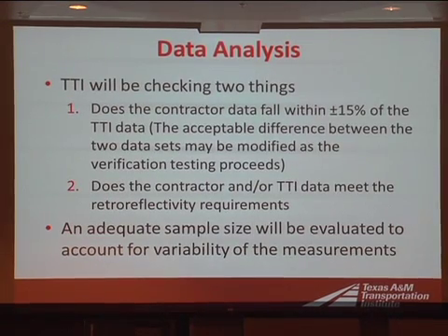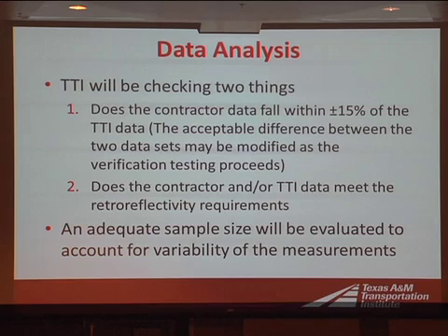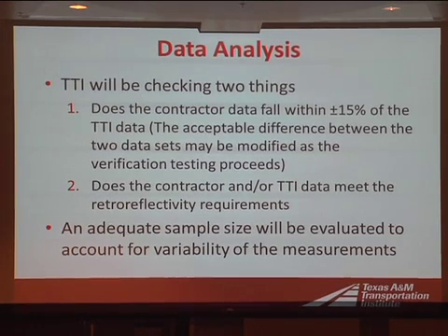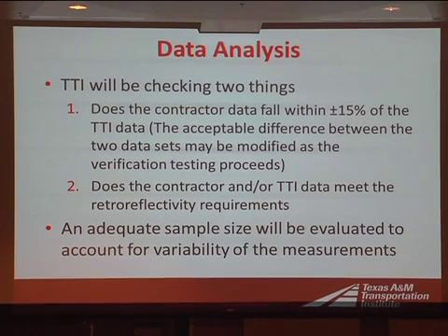So for the data analysis, we're going to be looking at two things. One of them is the accuracy of the data. Does it fall within plus or minus 15% of the data that we're collecting? Right now we're using the plus or minus 15%. That's what we've been using on the certification program.